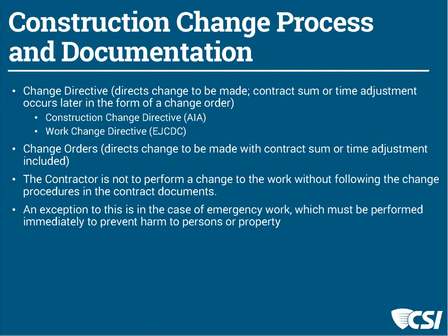A change directive is a document we use — a Construction Change Directive is an AIA document; a Work Change Directive is an EJCDC document. These direct that a change be made even when there's an understanding that there is a change in contract sum or time, but the parties have not agreed to the specifics or the specifics are not yet quantifiable. A change directive is issued so the contractor proceeds, followed by a formal change order that establishes the specifics for cost or time.